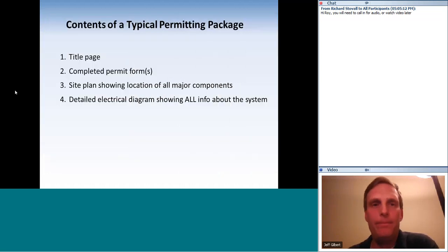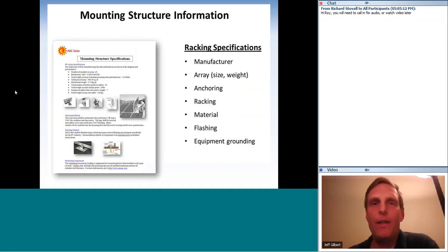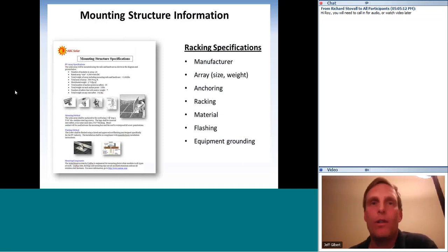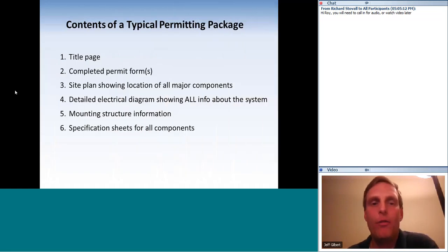The next item is structural information — everything permitting officials need to know about how you'll secure the system to the structure or ground mount: manufacturer, array size and weight, anchoring, racking materials, flashing method and waterproofing. You might also include information about equipment grounding. The last item in the package is spec sheets for all the equipment you'll be using.